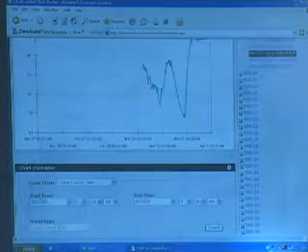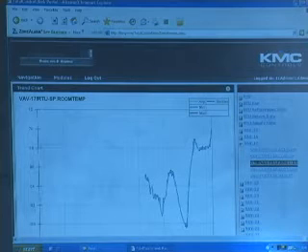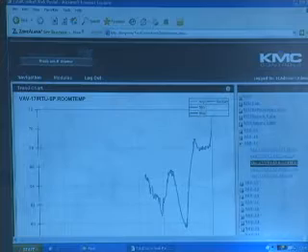But back to what we were headed to, the actual cycle of the project. So we've actually, back to where we started from, designed the project and we've submitted on it. Most oftentimes what's going to happen is the mechanical engineer will approve or modify our submittals to make sure that, to add integrity, the project is going to be installed the way it was specified. Then we'll actually dive into the installation.